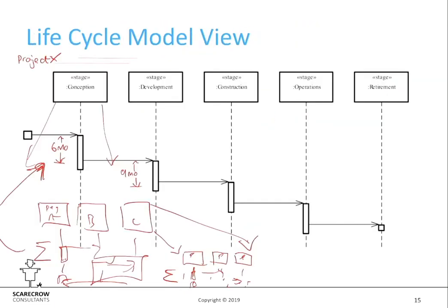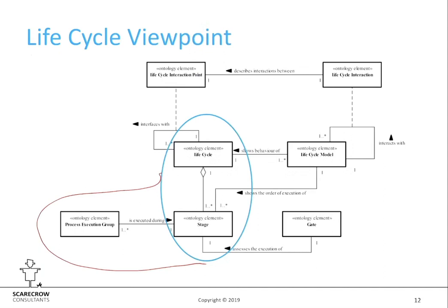We model things like this, and we put timings on, and we go down as far as the projects, and we can roll that all up. We put it in Microsoft Project. They are three levels of a project. So in our Gantt charts in Microsoft Project, we have our top level, our stages, then our process execution groups, and then our processes. As I say, sometimes we go down as far as activities.